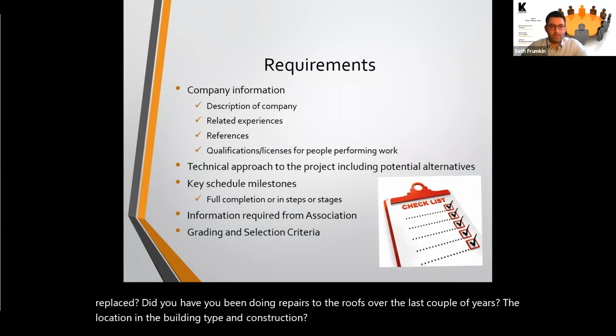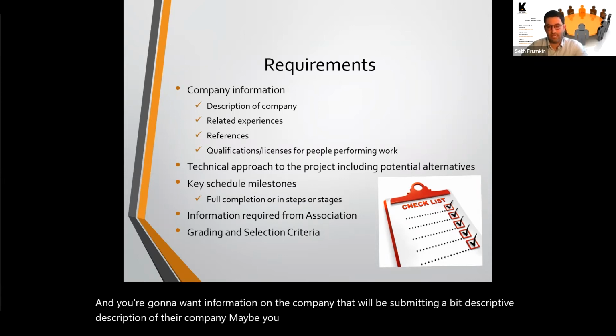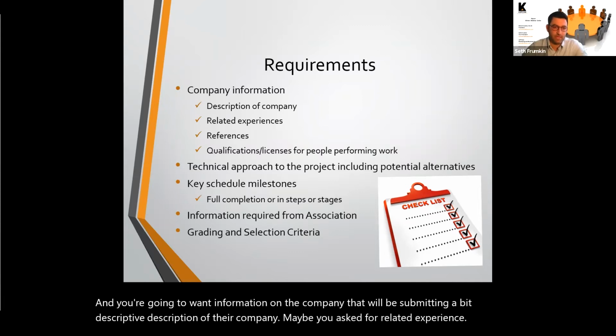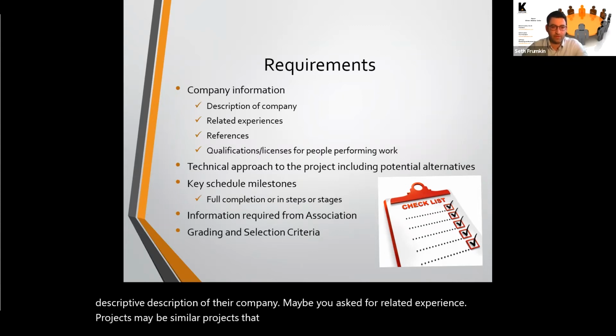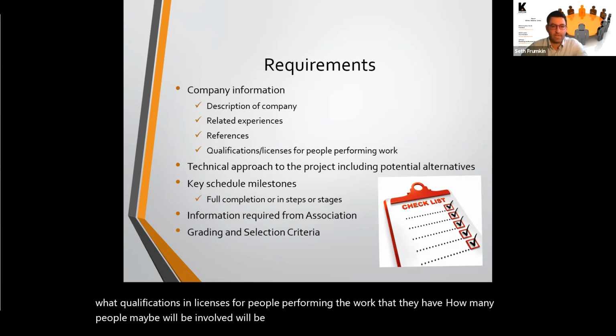And you're going to want information on the company that will be submitting the bid. A description of their company. Maybe you ask for related experience, projects, maybe similar projects they've worked on in the past in your area, references to call, what qualifications and licenses the people performing the work have, how many people will be involved, will there be multiple teams or crews, and the technical approach to the project, including potential alternatives.